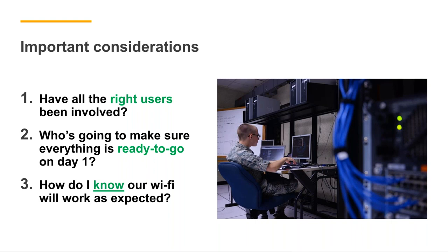So this becomes a critical component of operational planning, because if you don't do this planning up front, it can suck a lot of time out of all of your operational stand-up from day one. If you don't do it ahead of time, you're going to do it when they hand over the keys to you. That can take a lot of time and honestly result in delays of up to a couple of years if you need a lot of system software and applications stood up, but don't have the mechanism ahead of time and the operational planning as part of the construction and commissioning process.